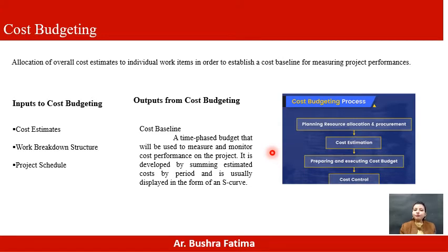And the output from cost budgeting is the cost baseline, a time-phased budget that will be used to measure and monitor cost performance on the project. It is developed by summing estimated cost by period and is usually displayed in the form of an S-curve.